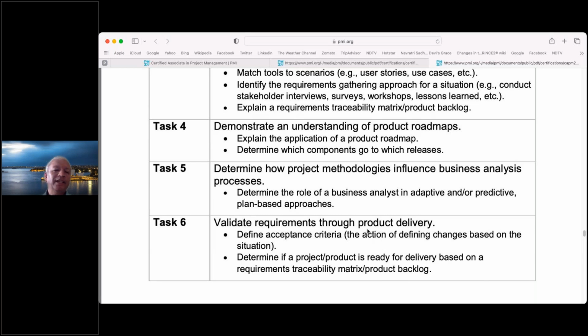So agile release planning talks about the product roadmap. The roadmap is going to have different releases, and every release is going to have different iterations or sprints, and in every sprint, how many features, which you can call user stories, we can deliver. To know how many user stories you can deliver, you have to have a story point estimation. That is where the tasks and other things will be created, and effort will be estimated. That is how the entire structure will be divided.